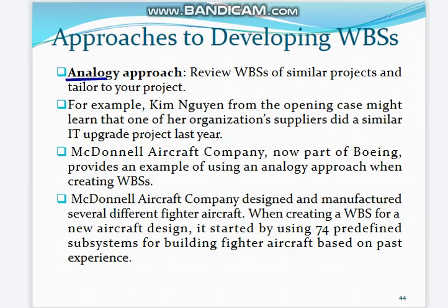Next is analogy approach. What is analogy approach? Review WBS of similar projects and tailor to your project. For example, Kim Jong from the opening case might learn that one of her organization's suppliers did a similar IT upgrade project last year.